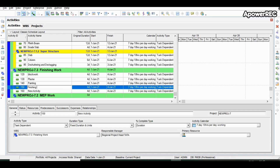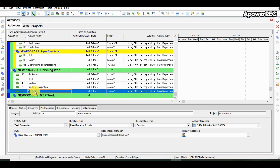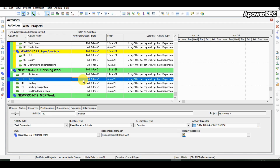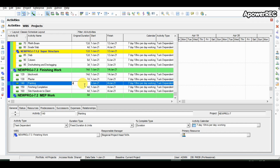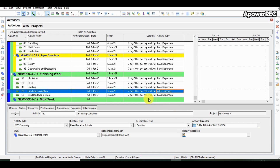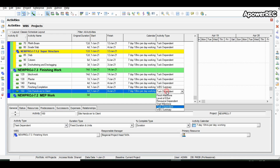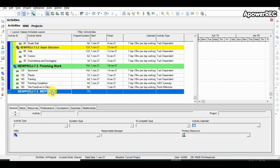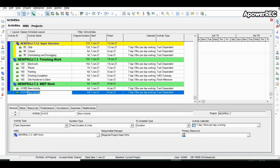After plaster at site MEP work will happen, and then painting. But in the work package we are putting painting after plaster. Now finishing completion and site handover to client are added. Finishing completion is not a task dependent activity — it is a WBS summary. We change its activity type from task dependent to WBS summary by clicking on the main screen, so it will show the duration of the finishing WBS. Site handover to client will be a finishing milestone. For finishing and starting milestones we must put relationships, but for WBS summary we do not. Also, start and finishing milestones have a duration of 0.